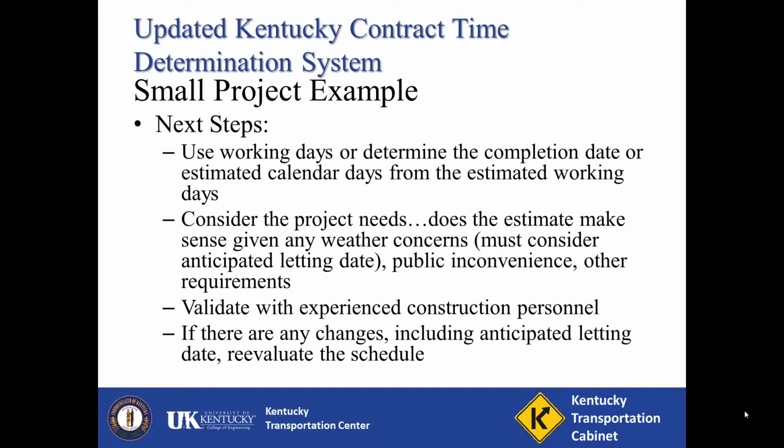Once you have completed the contract time estimate, there are some final considerations. Again, you will want to decide which type of contract time requirements will be used. You can use the working days or determine the completion date or estimated calendar days from these estimated working days.